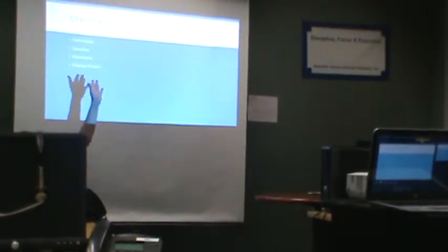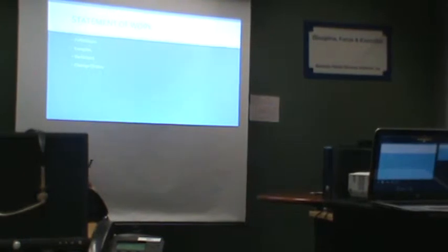Two types of change. Schedule, it's going to make us run slower, or it's going to change dates. Or price, instead of costing $200, it's going to cost $250. Okay? Then everybody's required to sign it. Second page has some summary information for it, and then this is filed away with the contract.